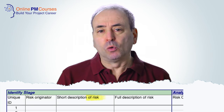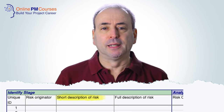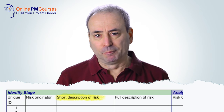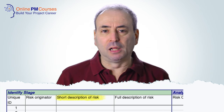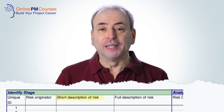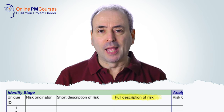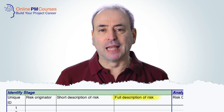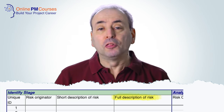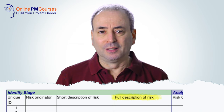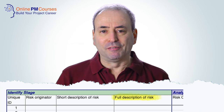Next, I'd have a short description or title for the risk — a shorthand description that can display easily. As a result it won't be a full description, so you will need another field for a long-form or full description. Let this be a full narrative field that can accept a large amount of text, because the more carefully and precisely you define the risk, the easier it is to find an appropriate response.